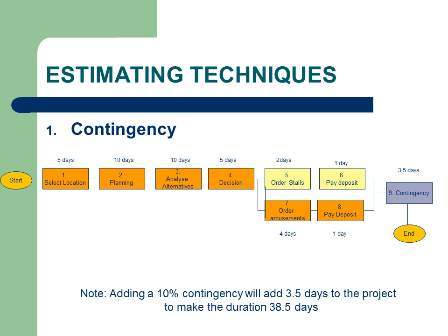In order to cover these situations, we use the concept of contingency. This means that we add some extra time into our schedule to cover unknowns. If we don't use the contingency, then we will finish early. It's best practice to place special contingency activities in your schedule and use that time only if necessary. If you add contingency to every activity, then human nature is such that they will always use the time allocated and it will be of very little benefit.